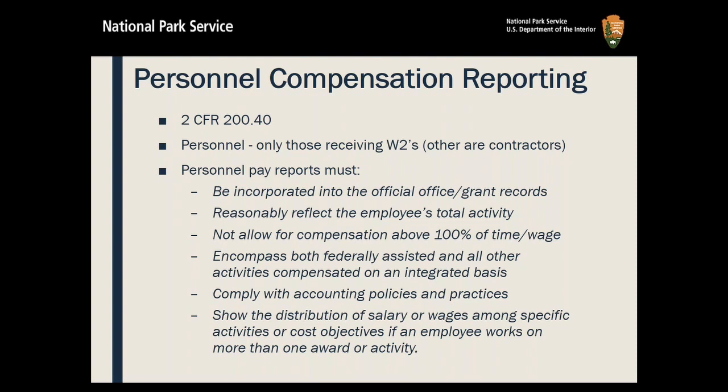You want to make sure that you're complying with all accounting policies and practices. And you want to show the distribution of salary or wages among specific activities or cost objectives. So if you are a lawyer working for this company and some of the work you're doing is as a lawyer for this project, you're going to charge your rate doing lawyerly things. But if you're helping the organization stuff envelopes, then you're going to charge the rate at which somebody who is stuffing envelopes should be paid. You would not charge the rate of a lawyer's fee.